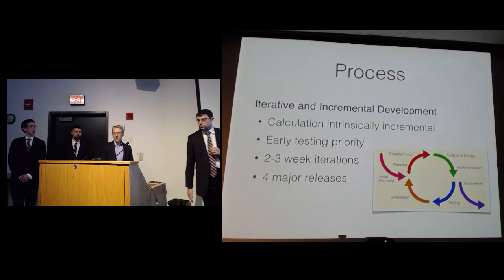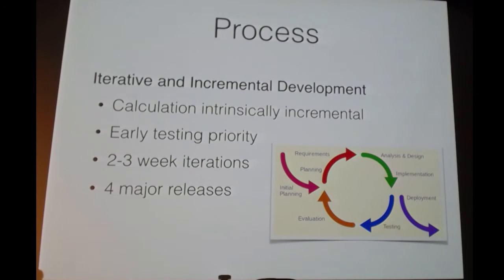So I'm going to talk a little bit about our process that we're using for this project. We decided to land on an iterative and incremental development methodology. This seemed like a natural choice for us because when performing an actual calculation, this breaks down into isolated segments of functionality that we can actually deliver as our increments.